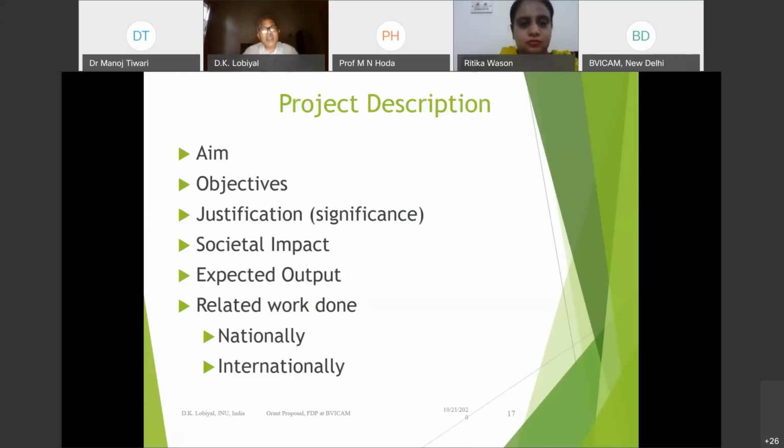So you should be very careful about what your aim, goal or purpose is. Then, to achieve that purpose, what are your sub-goals or objectives? These objectives may help you find out whether you are achieving certain milestones. What I am saying is that if I complete this sub-goal, I can achieve this target. If I complete objective 2, I'll achieve that target.